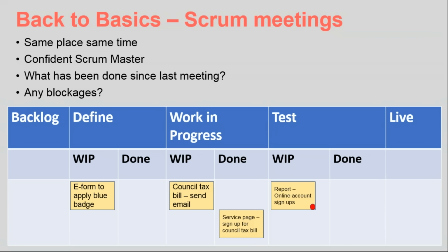So our meetings were really about capturing how people were progressing with their tasks and identifying potential blockers. And you'll be able to see right here, we've got a red dot on one of the tasks. Now we use these just to mark where blockers were, and we would work around the blockers on the board, moving tasks around them. One thing I'd have to say though is that having everybody around the board and having different people's perspectives and knowledge there at that one time, we usually managed to identify solutions to blockers before they even reached the board. So that was a positive benefit from that.